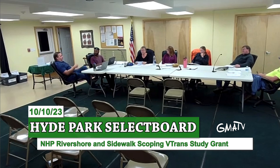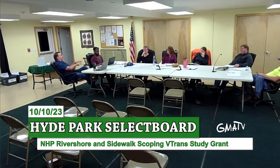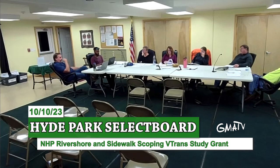So the state of Vermont has changed their funding conditions and permit process to elevate village centers with more flexibility than historically VTrans has been allowing. But you still have to go through this long process. So even though we had a scoping study in 2016, the state advised that, well, it's 7 years later, we need to incorporate these new policies and update the scoping study to drill into two ready-for-construction segments and look at those, which wasn't done the first time. The first one was more like a master plan. This one is more of which projects are going to be put forward and which ones the state will fund. So you always have an option, which Roland goes about from your village work over in Morristown, that you can always not take the grant.